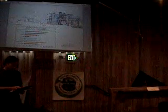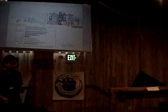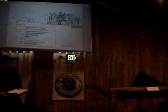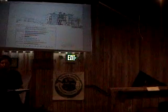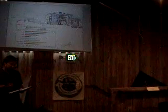But right now, we were assigned an assessor, and what they do is they take your documents, you get your CD set together, send them the specs, send them the drawings. They review it and give you a stage 1 assessment. And after stage 1, they give you kind of a review of where your online survey is versus where your drawings are. Any discrepancies or more information you can provide to them. And right now we're just past that step.